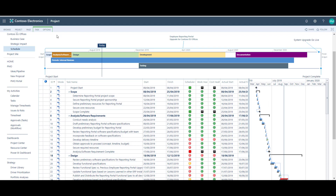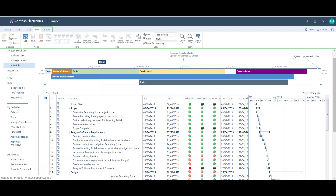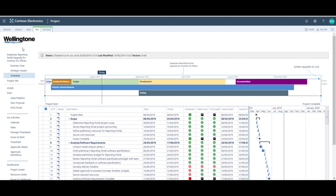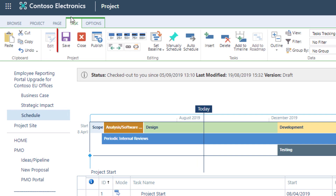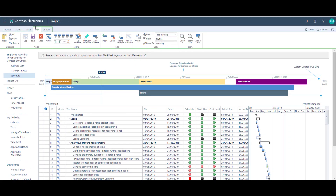To edit the schedule, I would go to the task ribbon, then click on edit and select in browser. By selecting in MS Project, this opens the schedule in the client for editing. Once you're finished making your updates, you must remember to save, publish and close the project, just like you would when in the project client. You will then also be prompted to check the project in. It's best practice to always check your project in, so do get into the habit of doing this.